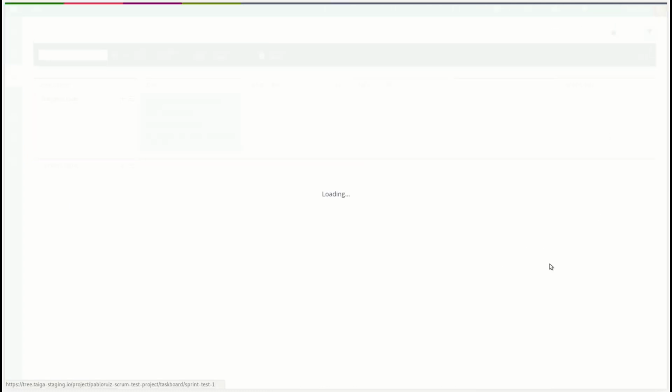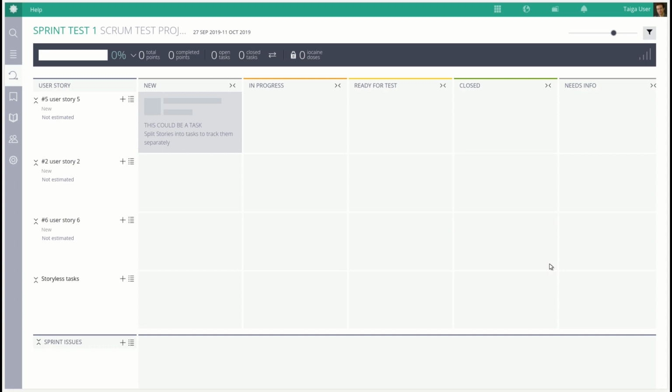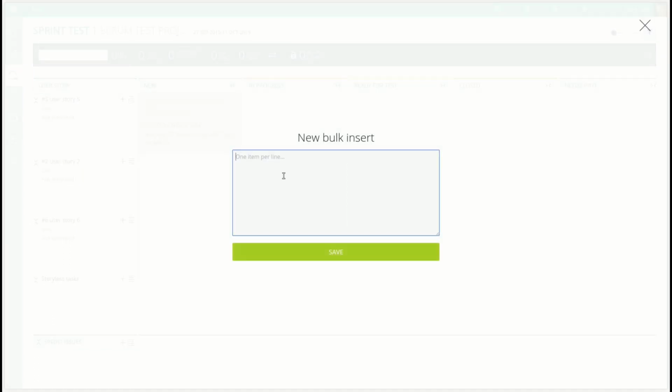And if I want to go into more detail, I have my sprint task board here. These are the user stories. User stories typically are split into tasks because some people might just say, okay, this is just one user story, one task. But usually what happens is you want to split a user story into tiny bits. And so I'm going to do that.